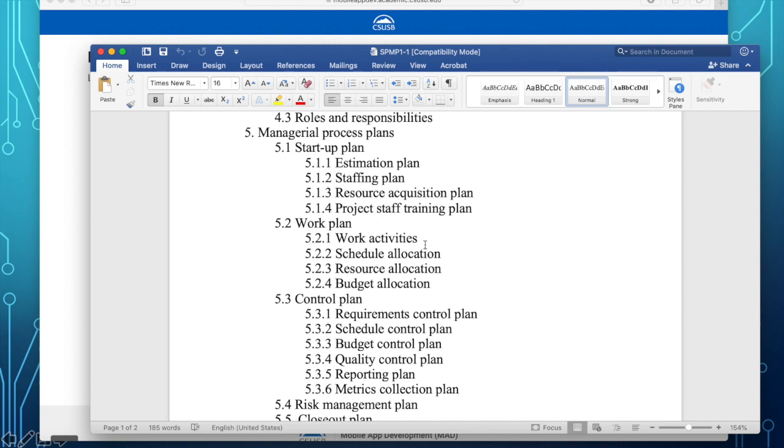development. Schedule allocation. I want to see in your schedule allocation a Gantt chart that shows the different activities that you're going to plan for the next 3 weeks. Remember, the 7th week is when you will deliver your first iterations. I want to see a specific date, month and date, on what will happen in the next 3 weeks.